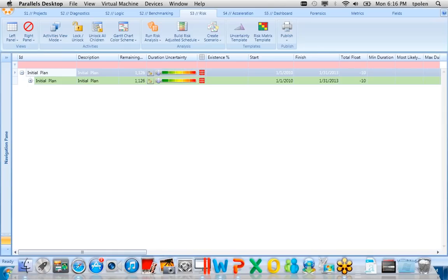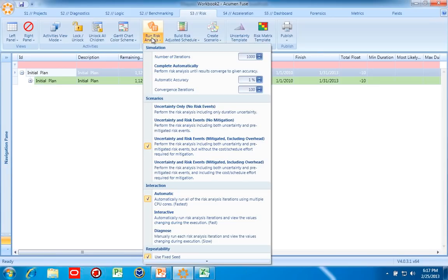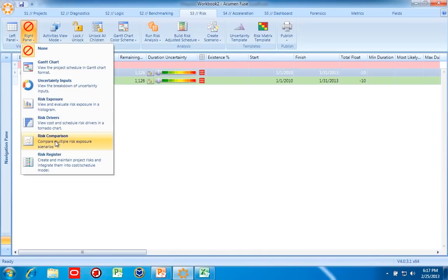Is there a mitigation comparison tool to show the biggest potential of mitigation for the least cost? That's a good question. Off the top of my head, you would have to look at your risk drivers and then come up with the mitigation plans that can meet your budget. Then you could build your first mitigation plan, based on scenarios, run your Monte Carlo simulation with mitigated, and then create that S-curve that we did earlier. I could go back into the risk register.